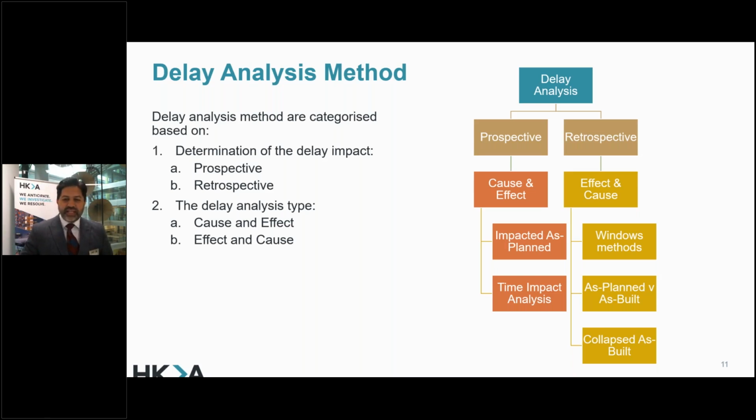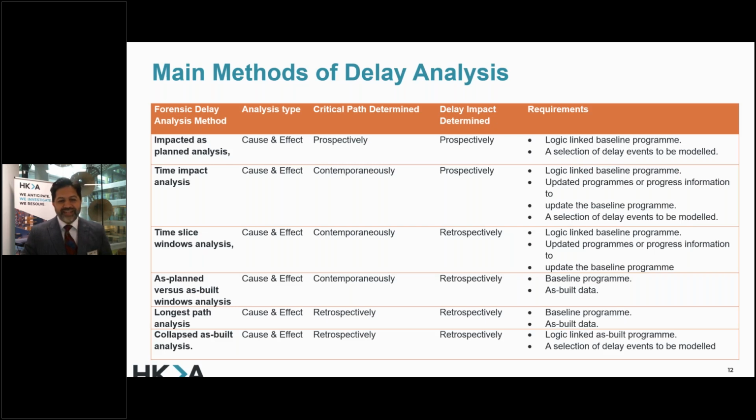When I'm discussing the main methods of delay analysis, as the previous chart showed, this has actually been taken from the Society of Construction Law SCL Delay Protocol, second edition, which is very much utilized in the majority of delay and quantum elements where such issues arise. You can look at impacted as planned, time impact analysis, time slice windows, which is again a retrospective element, as planned versus as built. In my experience, it depends on the project what method you are using. And the whole idea is to determine the critical path.